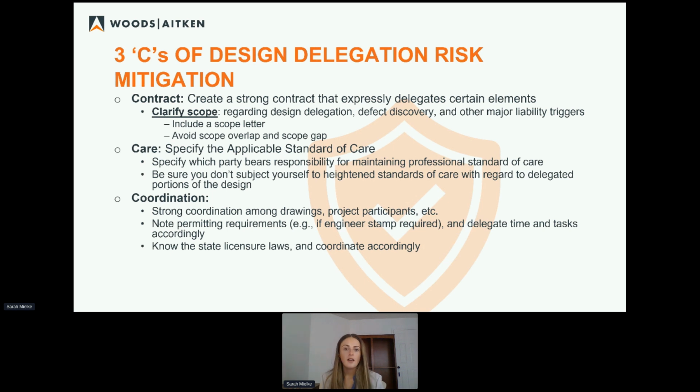Yes, definitely. A lot of standard form contracts will actually have provisions in them that disclaim a subcontractor's responsibility for performing professional services. So in a design build project, like we said, the design is not going to be complete right away. Maybe you're relying on 30%, who knows? But at that phase, the best you can do is disclaim liability for performing professional services.